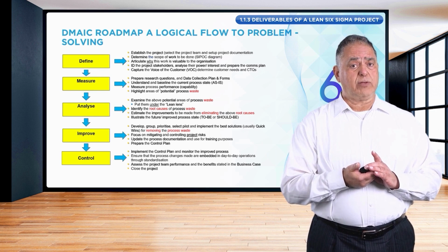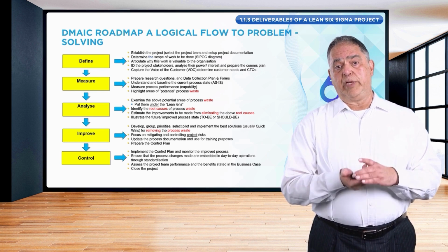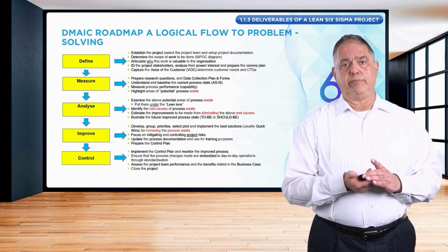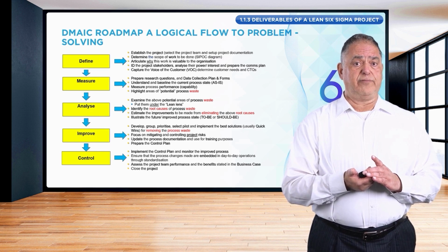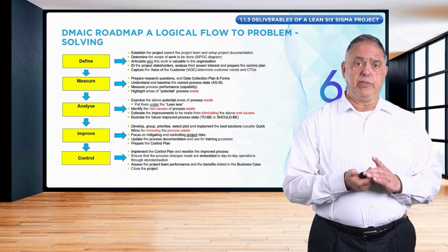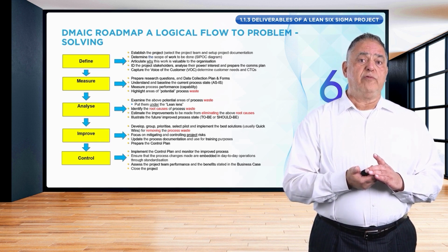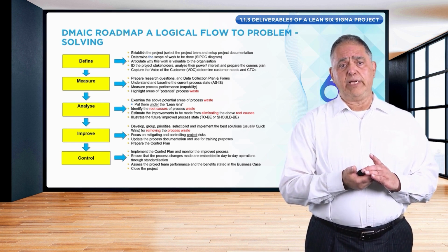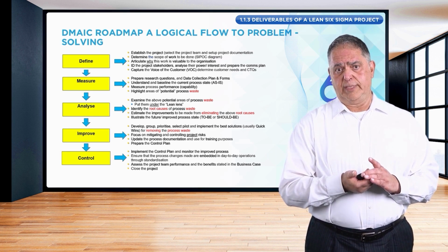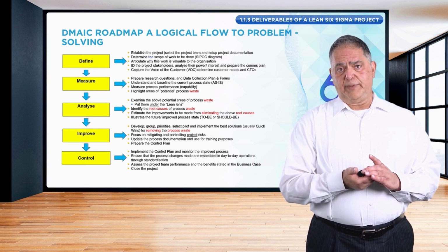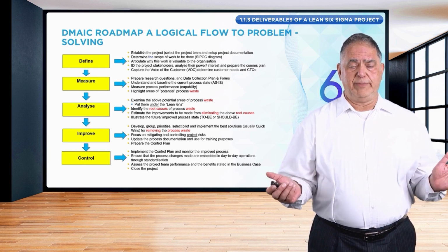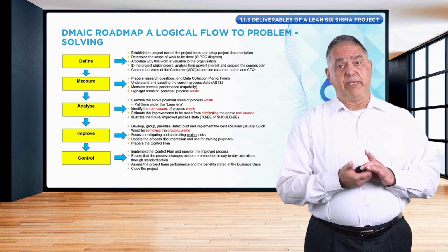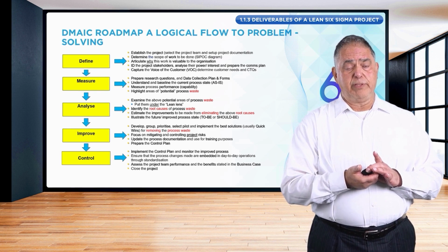And once these are completed, then we ask permission from the project sponsor in order to formally close the project and inform the key stakeholders. Once the project has been closed, the project team is disbanded and the benefits realization period begins.